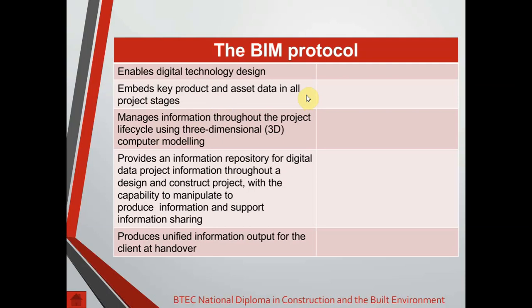So in the design stage, you've got all the concept parts. When it comes to sourcing those suppliers, you've got that information in there. And like I was saying, once the building's in use, the building managers can look in there and they can get the support, they can get the suppliers if they need that. Because the idea is you want to produce unified information output for the client at handover.